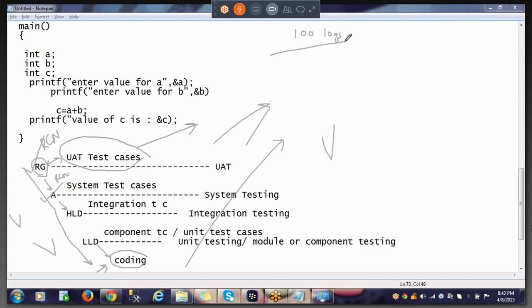The entire project also, they will not go with the implementation of the complete project at once. The V and waterfall models were giving that kind of instance, like taking the entire work at once and only after completion delivering it. That throws a negative impression because the user has to stay idle, and at the end, if the user says this is not what he expected, then again we have to correct ourselves and redo the things. Now here, the incremental model says, okay, break the things, go part by part.